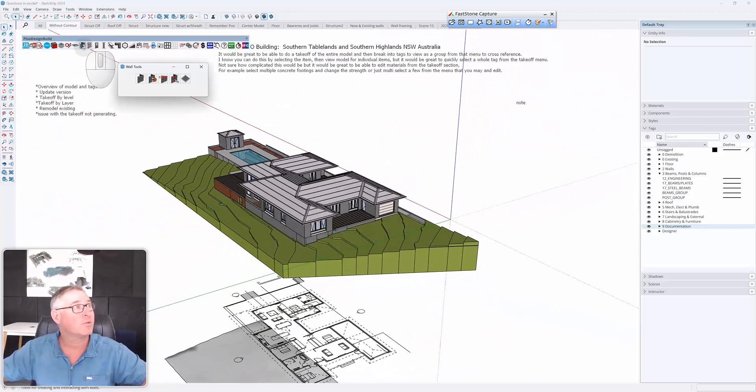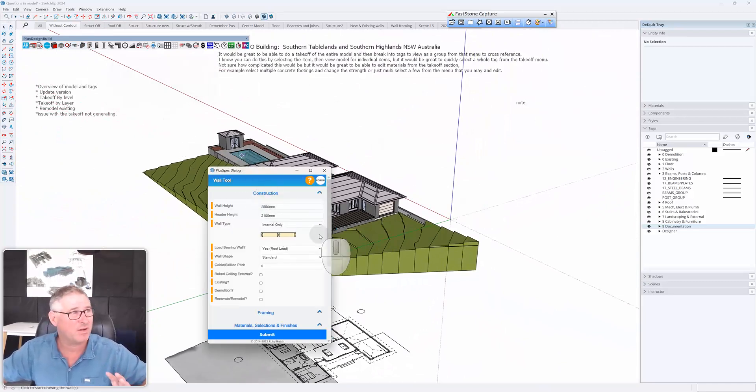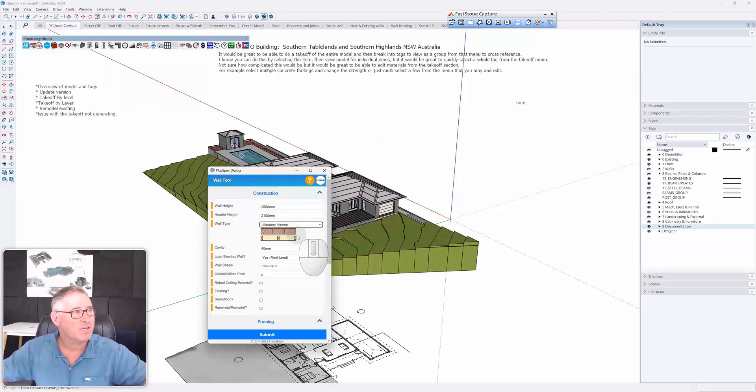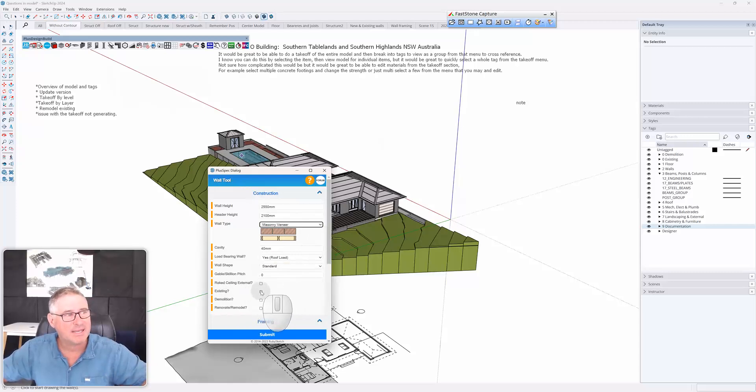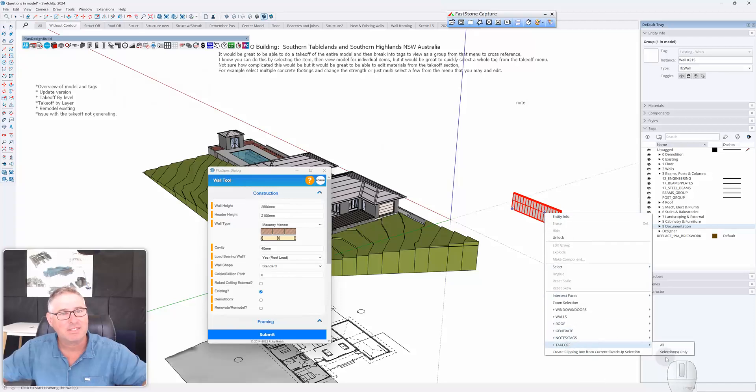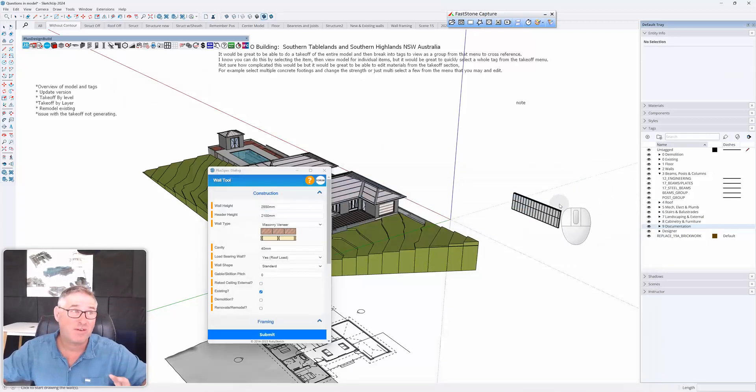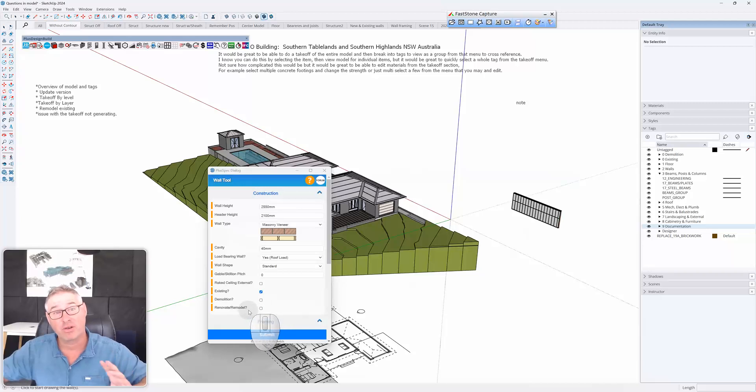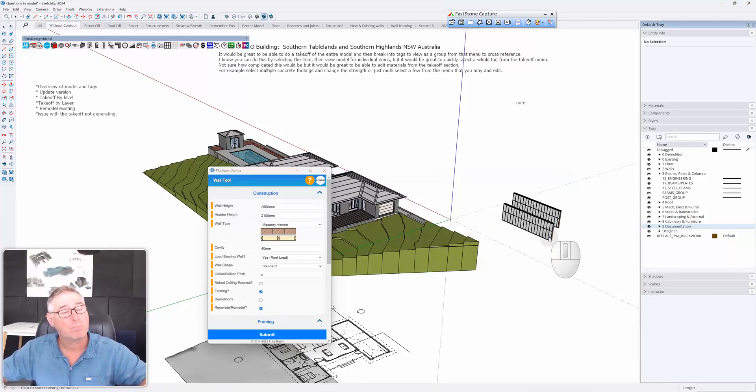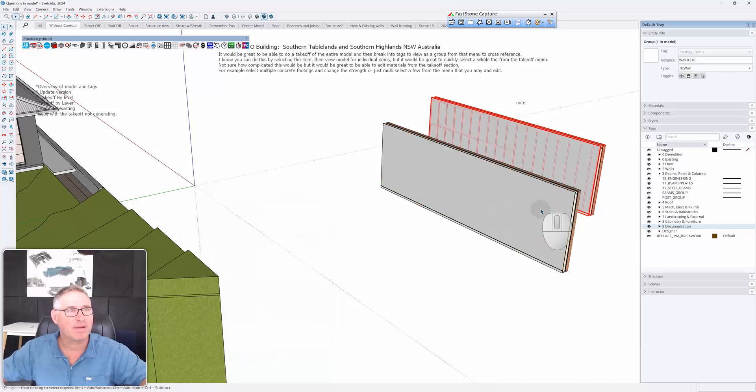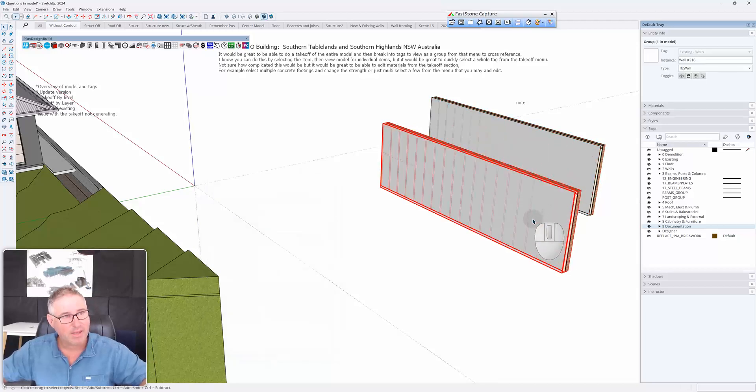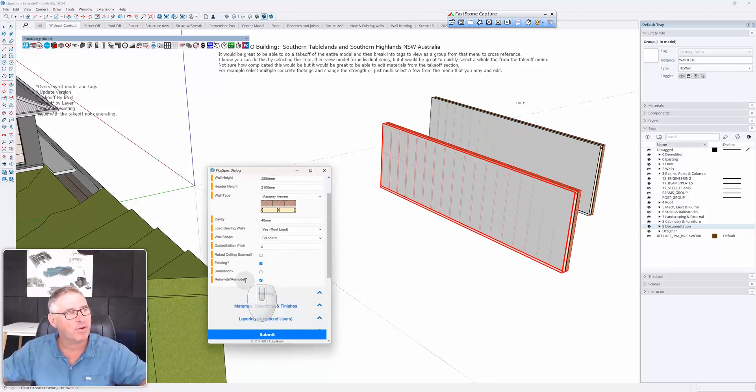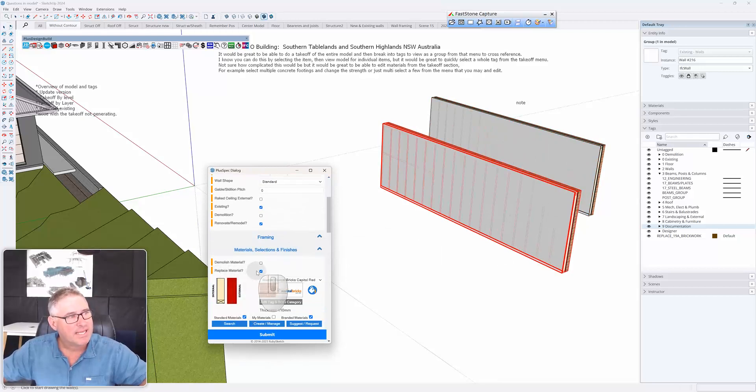Now, the reason why I think this has happened is because probably Adam wasn't aware of the functionality that we probably haven't made as much of a song and dance about as we should have, and that's inside of the wall tool. I'm just going to quickly go and open the wall tool. And you'll notice we mentioned this briefly in the last video. When we have a wall, I'll make it a masonry veneer wall, we have the ability to mark it as existing. Now, if it's an existing wall, it just means it won't quantify. So if I draw that wall over here, right click and takeoff, selection only, that wall won't quantify. It's already on site. We don't have to do anything with it.